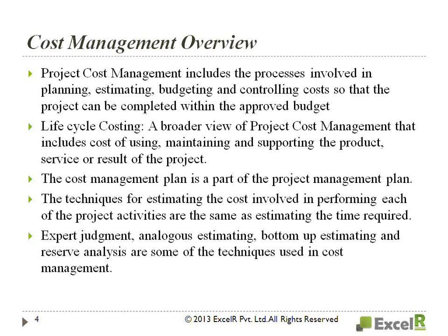So every month it's costing $5,000. $5,000 into 12 months is $60,000, into 10 years is $600,000. $600,000 plus the initial $10,000 capital expenditure, so $610,000 is the life cycle cost. So you have to consider both.